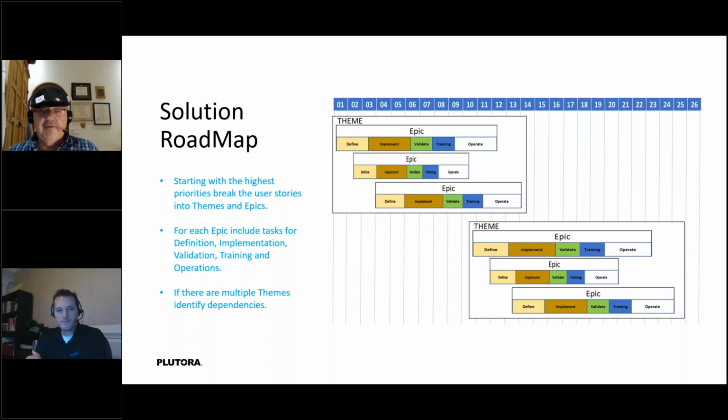So you break it into a plan. It's basically a planning exercise. Involve the project management team. Decide what are the epics? What are the themes? And get all the way down to user stories and implementation assignments, like who would do what. If you haven't got it to this level, then you really don't have a solution. You're kidding yourself if you haven't taken the solution down to an implementable solution.